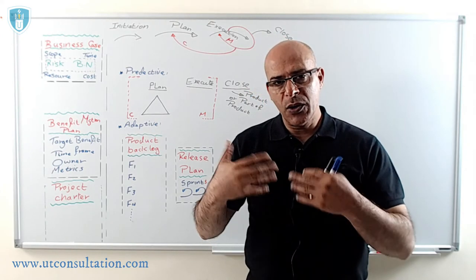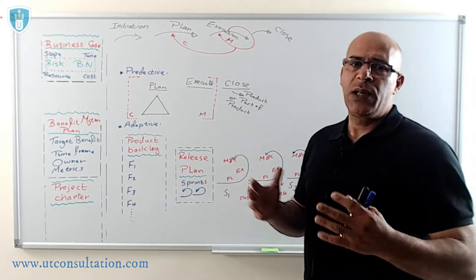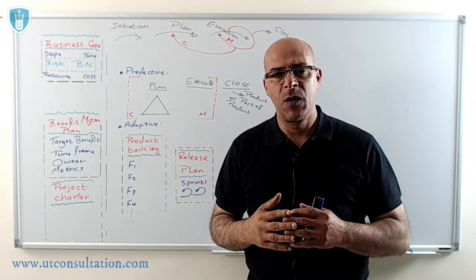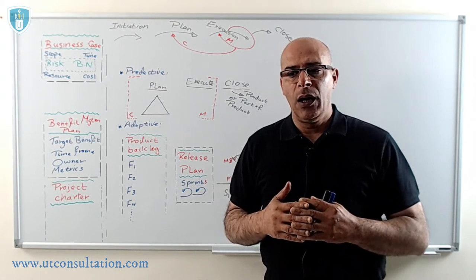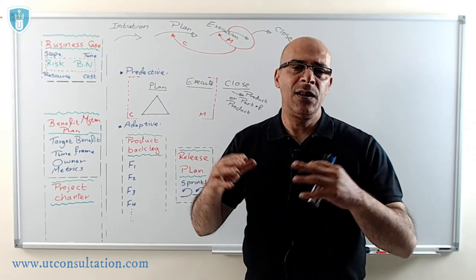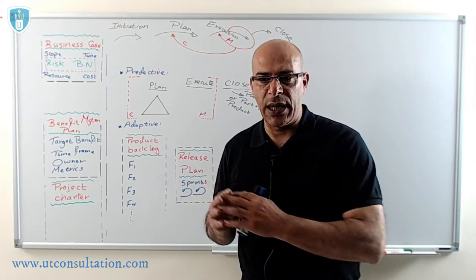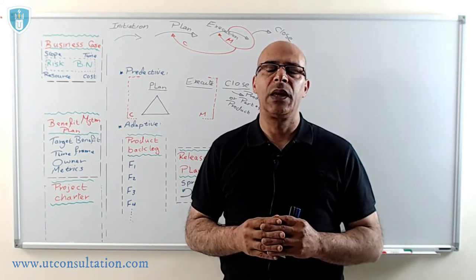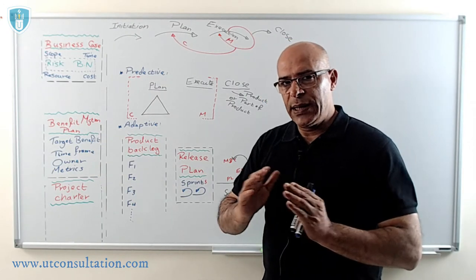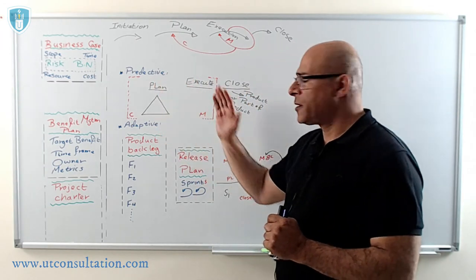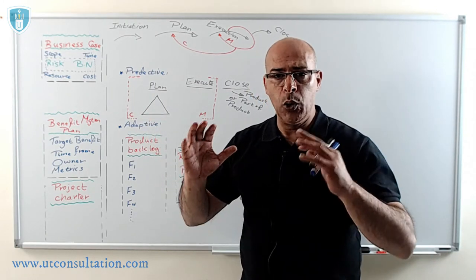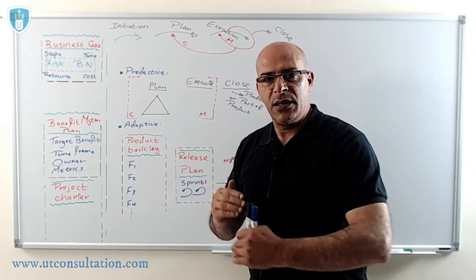The predictive life cycle — sometimes called planning-driven. From the name 'predictive,' it means when the product is clear, product scope is clear, project scope is clear, no need for quick adaptations, and uncertainty is low. This method is typically used. In a predictive life cycle, we know where we are going with this project, so we can plan accordingly. The idea is: plan ahead, plan then execute.